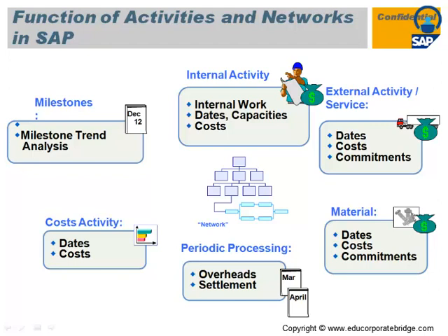So WBS is a temporary cost collector. Later on you have to settle that cost through the settlement process, which is captured under the FICO module. So WBS is a temporary cost collector, or a bucket of the cost. It will accumulate all the cost on that particular WBS.